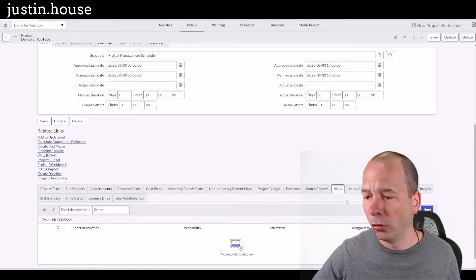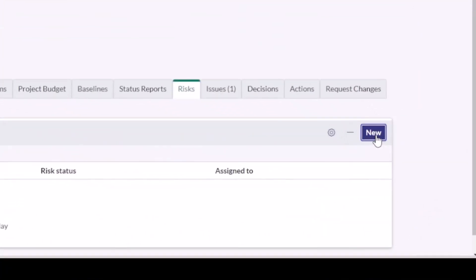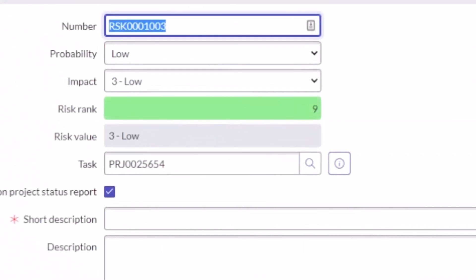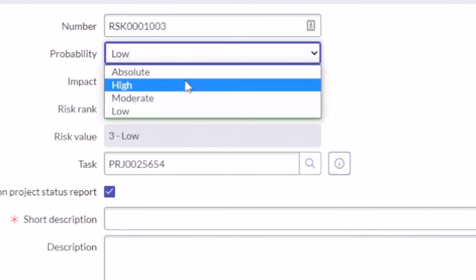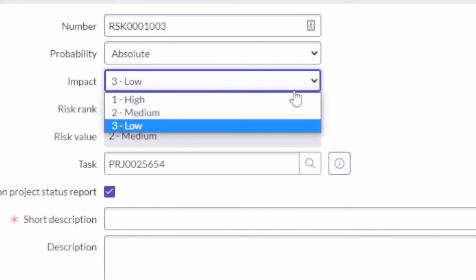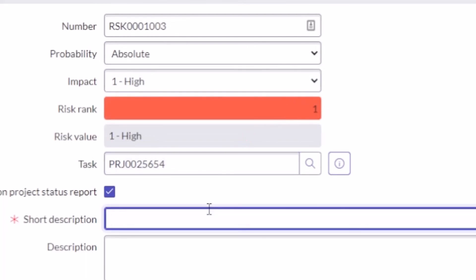So if I was to come in, we'll do one more live. So you can see here, we're going to create a new risk. This is something people might want to know about, right? I've got a new risk that's been determined to be absolutely probable. And the risk impact is high. And so that gives it a risk rank of one, a risk value of one high. And this is a very big risk just happened.